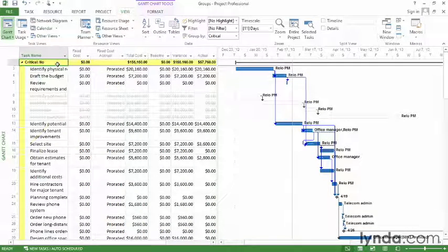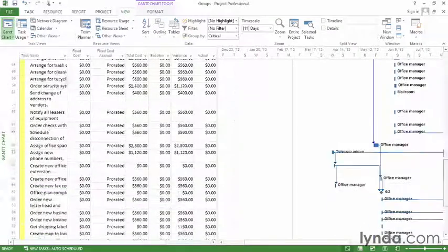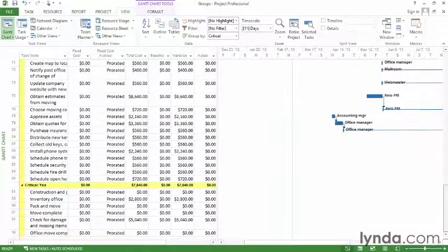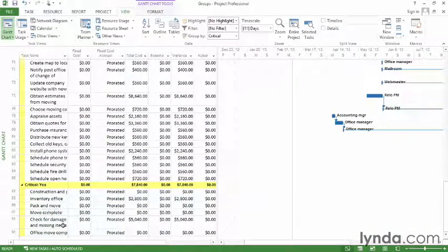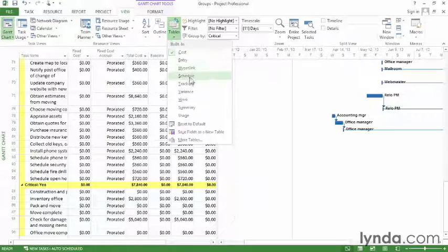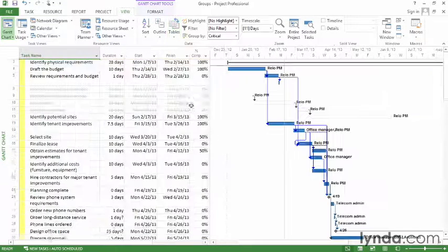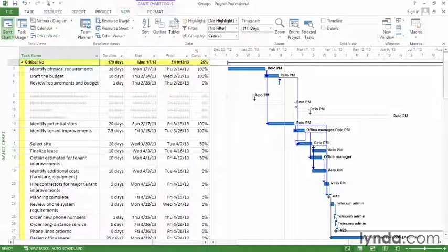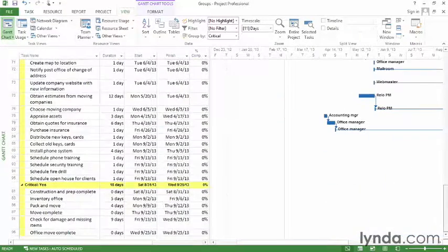And now you can see critical no. And if I drag down to the bottom, there are a few tasks that are critical yes. So those are the tasks that are critical and I want to look at for crashing. Well, I also want to group by duration. I'm actually going to change the table. I'm going to go back to the summary table so I can see the duration. Get back down to the bottom of the list and look at my critical tasks.